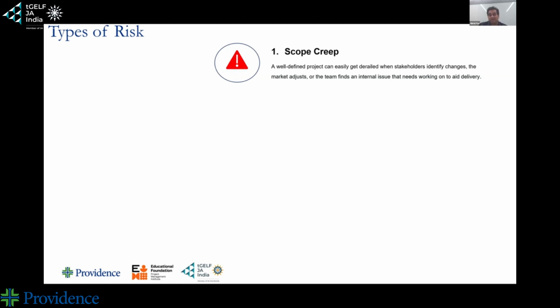You want to keep an eye on what is planned. And this normally happens in an SOW, which is a statement of work. In technical companies, we also use something called a TSD, a technical solution document. So you have technical solution documents, you have SOWs. These are the documents that stop scope creep, and then constantly talking to your stakeholders.